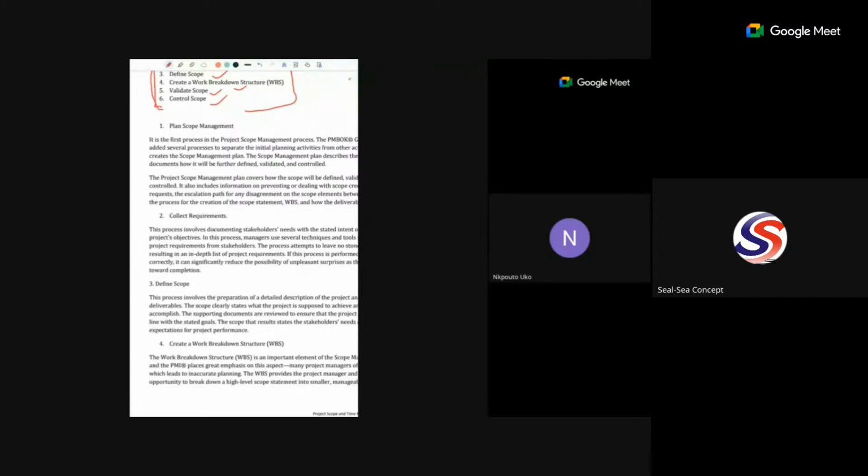You know, that is still making sense. So you will just tell him that he should make a change request, that he actually wants to implement something, and then you go back to the drawing board and see what it will cost you additionally in terms of time frame, and what it will cost you in terms of resources, so that you request for it. That is still within the kind of project you are carrying out.